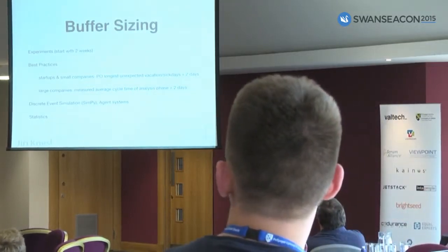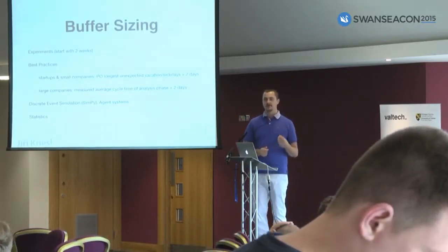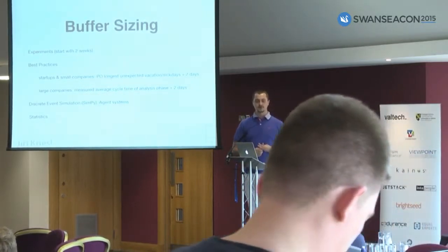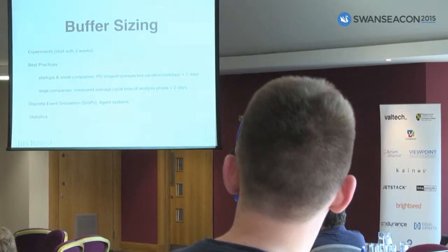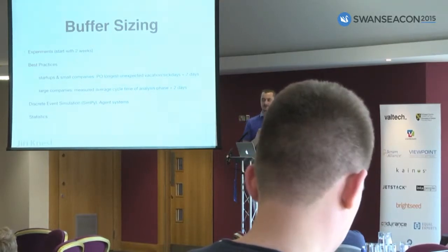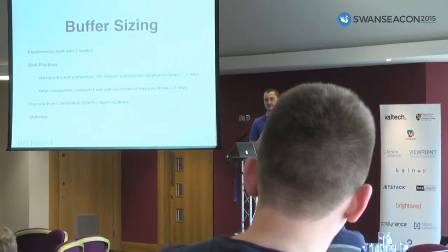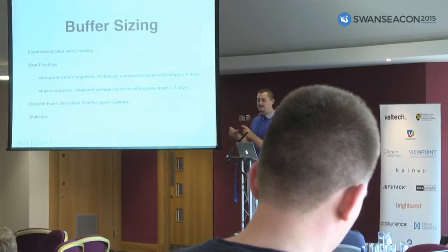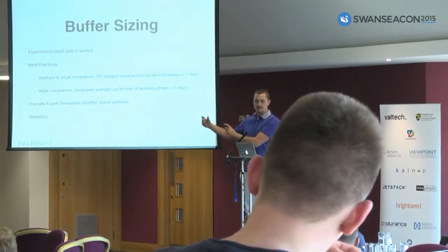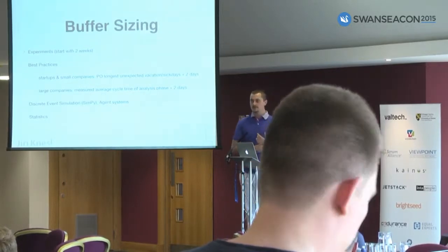You can have a steady flow of tasks. I prefer that, and when I create methodologies for my clients, I do a steady flow and I don't use fixed iterations. But we can begin with, for example, 2 weeks of buffer. So there is something like a sprint backlog, but it's sliding. It's still moving forward with the development, and we get it smaller and smaller. It's one of the approaches.